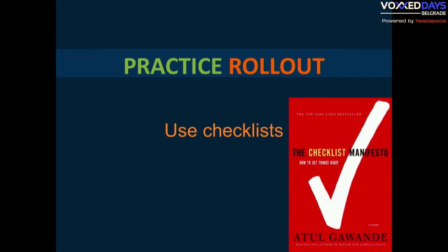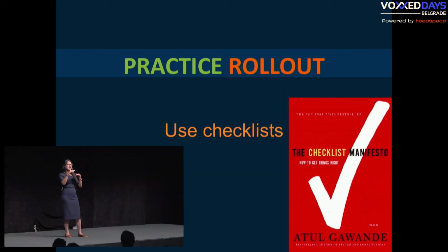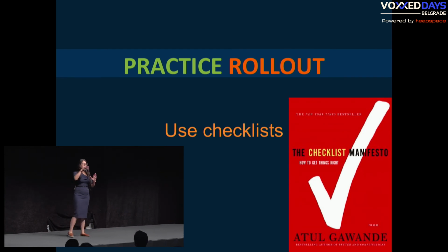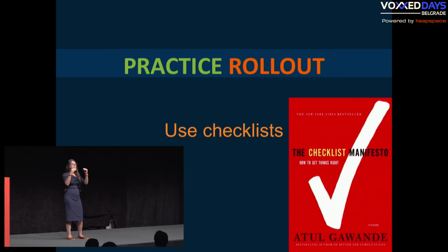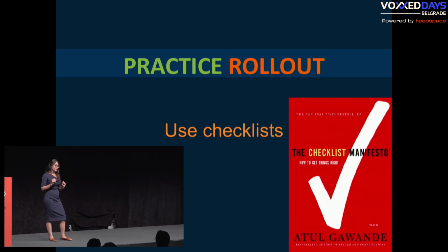And also, something that came in really handy is using checklists. So what we had is multiple steps. I think it was at least 12 steps in the rollout plan that we wrote, and ensuring that we understand we're on the same page about how the migration is going to go and how the rollback is going to go if at any stage we detect issues.